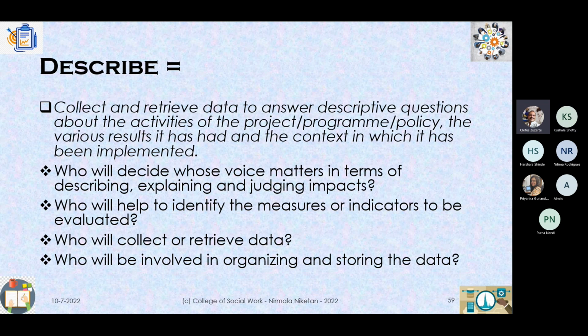Now, I'm just giving you a contrast. In normal evaluations, the outside evaluator will take a design. This is actually called designing the evaluation. In a normal evaluation, the outside evaluator will make a design saying that there are 20 villages and I need a sample of 3 villages, and I need a meeting with six SHGs or whatever. He will do a random selection from the 20 villages. He will select SHGs that run across any 3 villages, or 6 villages, depending upon the numbers that he requires.